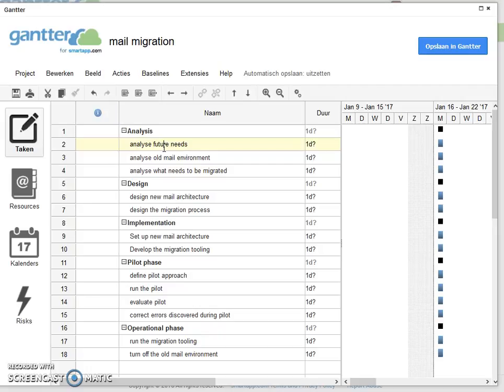You are only allowed to do that for those activities which are not bold. So don't enter durations for those main activities, only do it for the non-bold ones. You need to reason on what needs to happen during that activity, and you need to guess how long this activity will typically take.